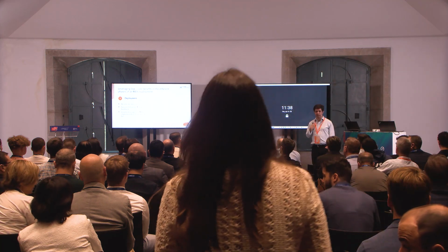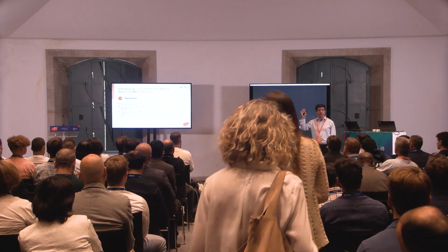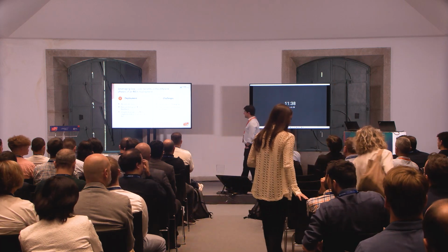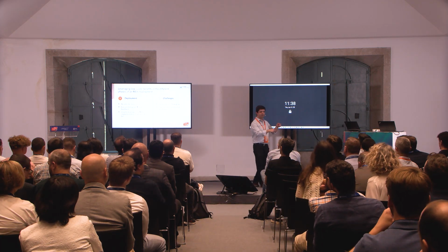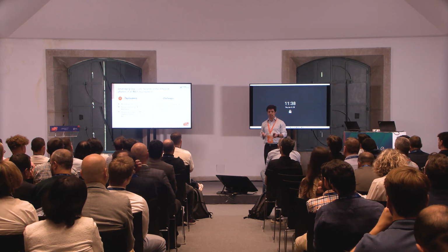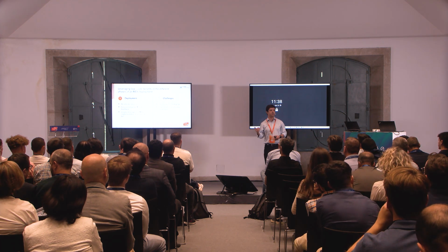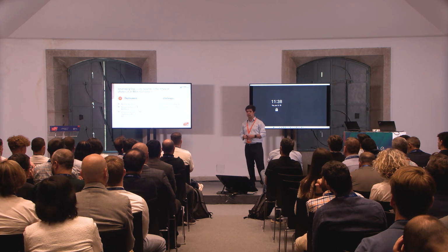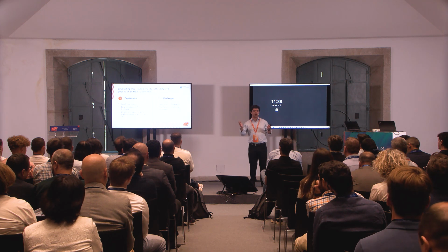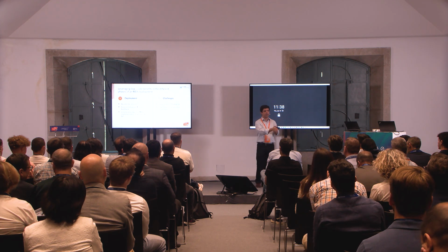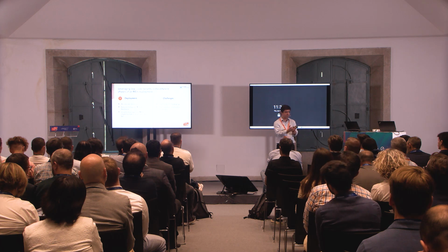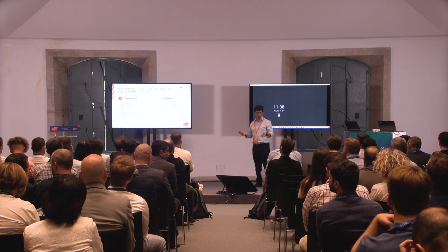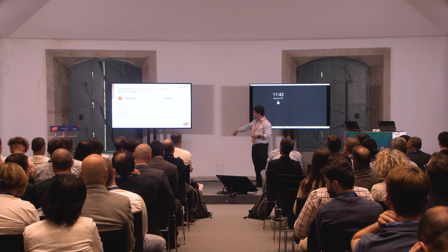From our experience, we are not seeing end users contributing at this point. It's too early in the game. Challenges. I mean, we can't be clicking around and building stuff without a proper process to package this and to deliver this to the customer. So we need a way to deploy this in a structured way, and what we actually do is package all of this in exactly the same way as we package everything else that we do. There is one single installation package. It will include everything that we write in terms of code and everything that we do in terms of low code. And then we have the dreaded productive prototypes.